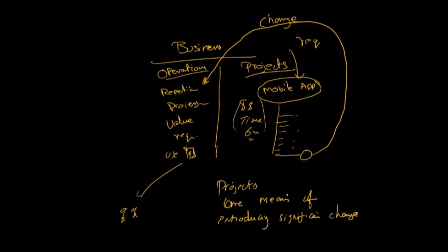change. Well, if it's a small change, you can even take it as an operational task, assign it to one of the operational managers, and he will get it done. Small changes. If it is a significant change, a big change, it is structured as a project so that we can control the change, development and deployment, achieving the objectives in a better way. The success of the project, the success of the change, will be much better rather than doing it as an ad hoc task. That's the whole purpose of your project, right?